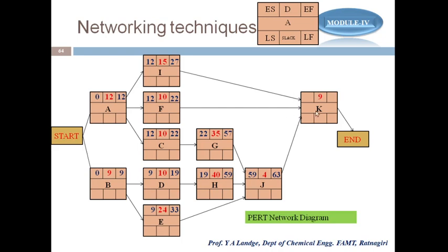Similarly, for K, I is there, F is there, and J is there. K will start only when I is finished, F is finished, and J is finished.